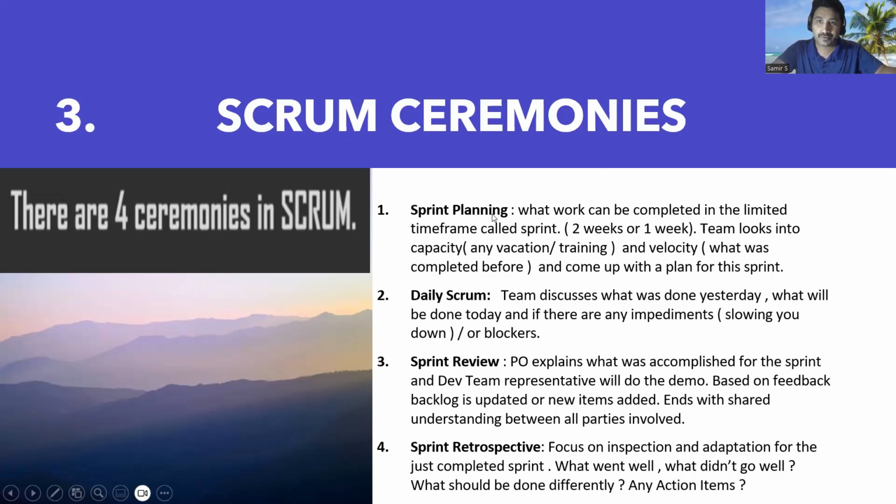Okay, so sprint planning is a meeting. It can be 1 hour, it can be 2 hours. It is always time bound. So if the sprint is going to be 1 week or 2 weeks, the sprint planning can be 1 hour or 2 hours based on the requirement of the team. But it's always a preset amount of time. You have to set the time in everyone else's calendar so that they are aware how much time is being taken for the sprint planning.